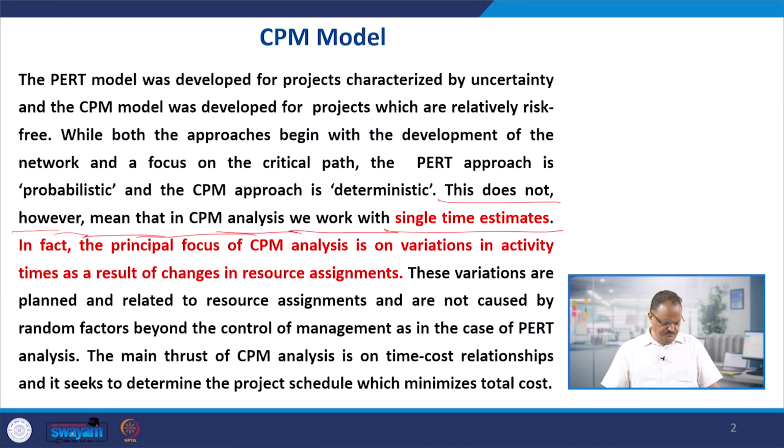If we are ready to employ more resources, to invest more in terms of direct cost, can we reduce the time? If you increase the resources tremendously, the time can be significantly reduced, right? So there are no three time estimates, that is TO, TM and TP. That kind of estimate is not there.